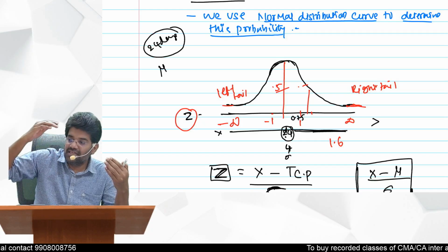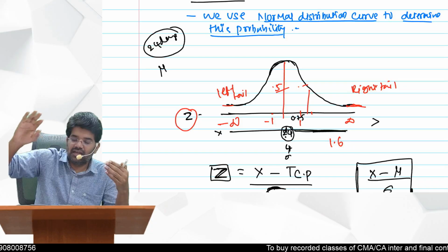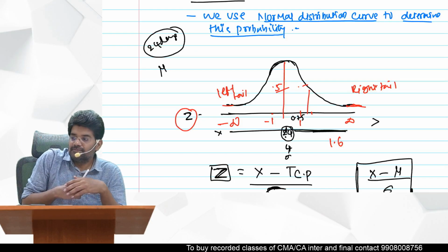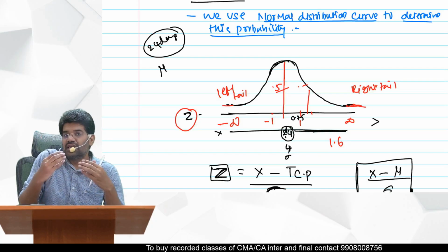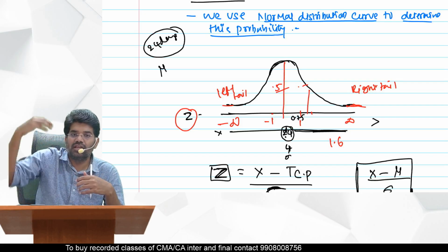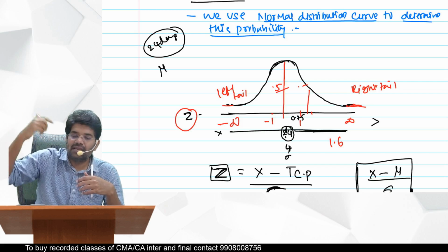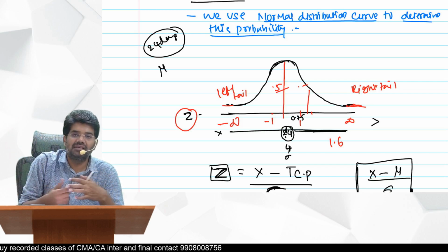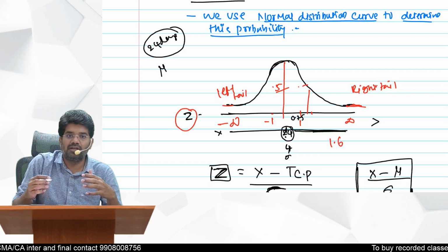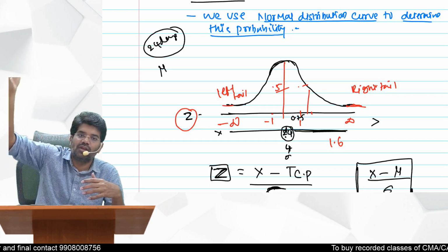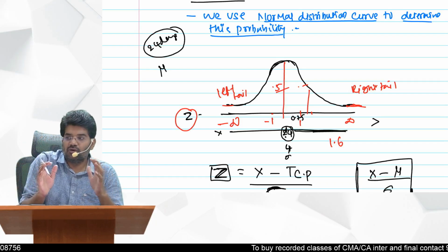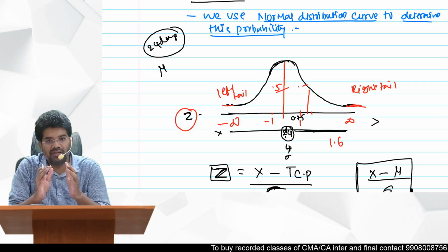If the probability is, say, 90% that it is more than 24, and you have to complete your project within 24 days, then definitely you should not take up that project, because going by this normal distribution table, the probability of the actual completion time is more than 24 days. So why do we have to calculate probability? I hope you understood now why we calculate probability here.